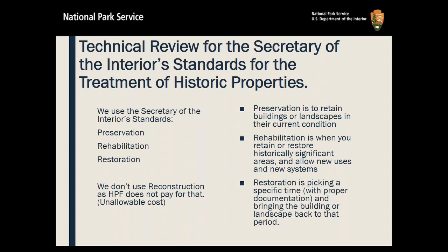You'll see in your grant agreement, it's another review, and I, of course, will do this at the same time. I promise you, you don't have to submit it again. So when you submit your project to your grant manager and say, we're ready to get rolling, we have our consultant, we have our architect, we can then review the plans and specifications for your project. I'm going to review it for the technical review for the standards, as well as submit it to the State Historic Preservation Office for the 106.